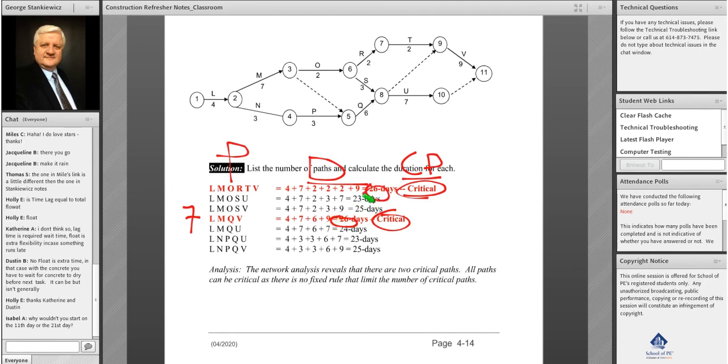You list all seven and you find that there are two critical paths. The project's going to be 26 days. So as a result, we know that there is no rule that says there's only one critical path through the network. All seven could be critical, so there's no such thing that says I only have one critical path.